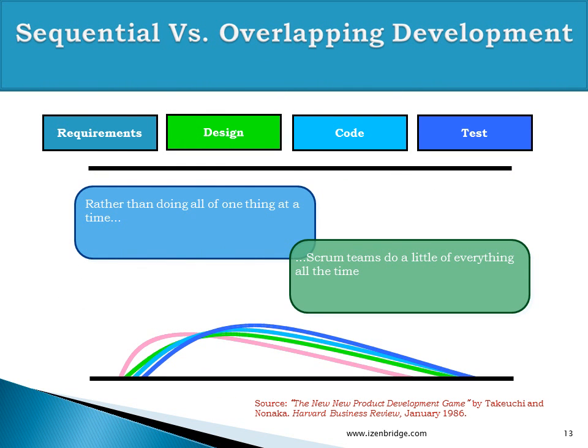Scrum development is not sequential development. Sometimes we get a feel, or make an assumption, that in Scrum we need to work in short delivery cycles, but inside that particular delivery cycle we still need to run a phase of requirements, then design, coding and testing, in a sequential way. We sometimes visualize that we would be running a mini waterfall, a small waterfall for that particular month. This is what is not expected.